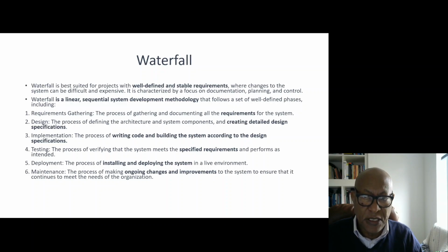Now, the waterfall is best suited for projects with well-defined and stable requirements. What it really means is that because this is a linear sequential system development, if we change your requirements, it requires a change of design. But the waterfall is not suited for a frequently changing requirement. This has to be stable. We know exactly what we're looking for, and then we can go ahead and design the systems and implement.